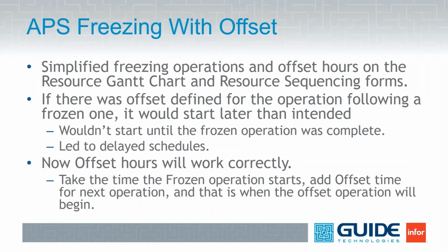So now that offset works like you would expect. It takes the time that the frozen operation starts, it adds the offset time for the next operation, and that is when the offset operation will begin. It doesn't have to wait until the prior operation is complete.